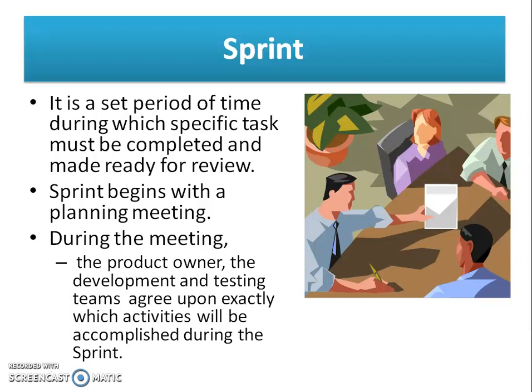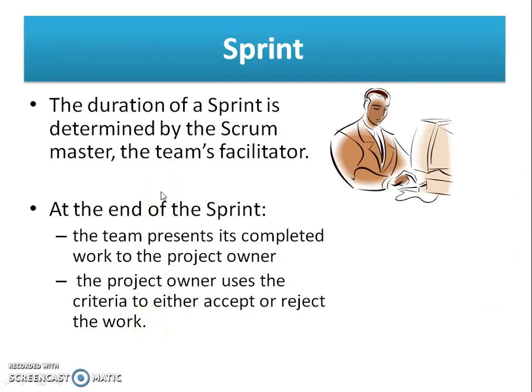What exactly is a sprint? It is a set period of time during which specific tasks must be completed and made ready for review. Sprints begin with a planning meeting. During the meeting, the product owner and the development and testing teams agree upon exactly which activities will be completed during the sprint. The duration of the sprint is determined by the sprint team. The team presents completed work to the product owner, who uses defined criteria to either accept or reject the work.